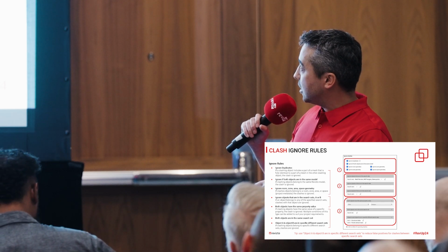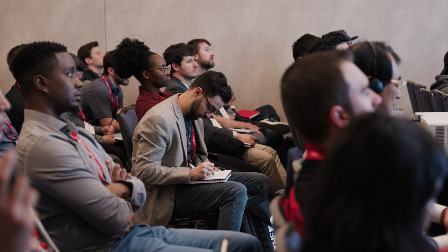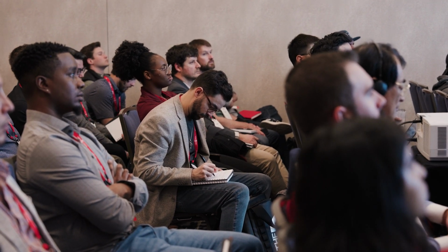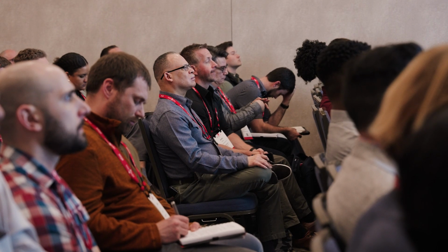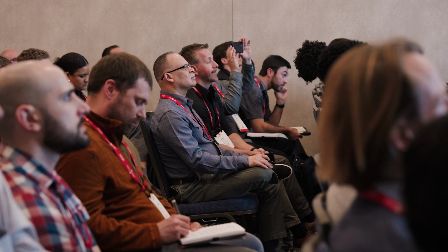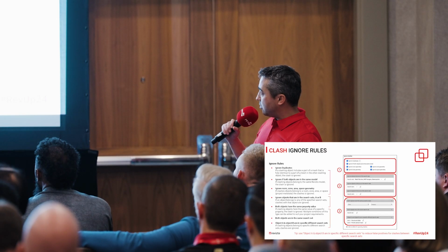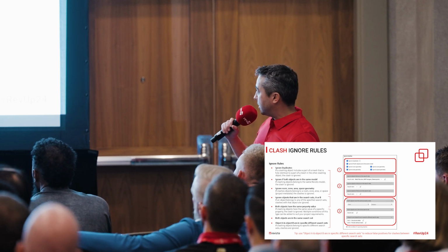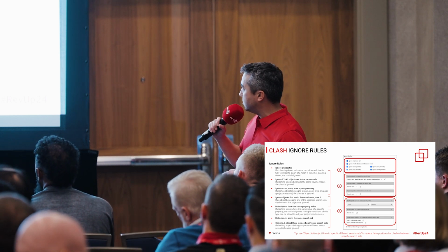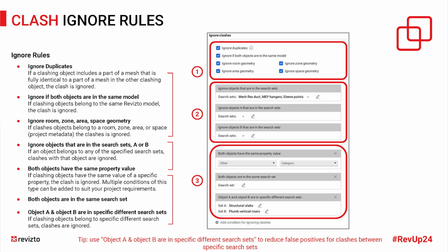And you can see all the different types of rules you can create. You want to obviously ignore any duplicate overlapping geometry. And I would highly recommend you ignore all these because this is the metadata that's being brought in from Revit or your authoring software, which is invisible, but it actually is three-dimensional, so it would detect that as an object, so you do want to ignore that. And then obviously we don't need to catch all the stuff like flex duct. Hangers, you might want to catch that, but right now, early on in the phase, I don't want to do that yet. I might do that in, like I said, a more micro test and just find hanger clashes. And that's at the tail end of coordination. And obviously, any trimble sleeve points, I'm going to ignore that.